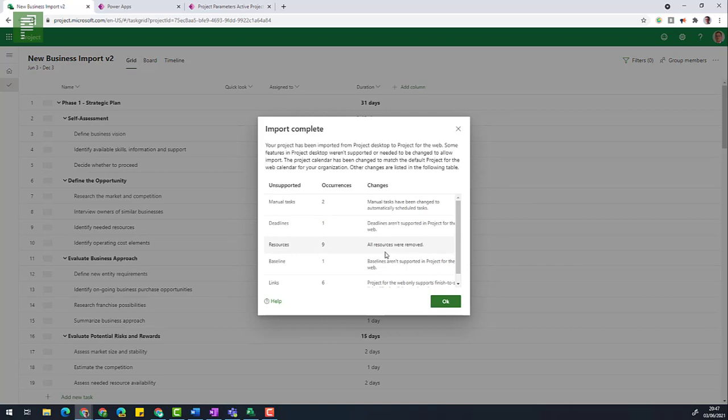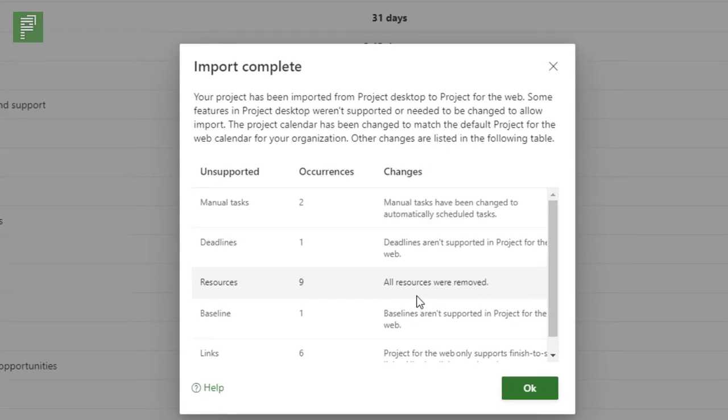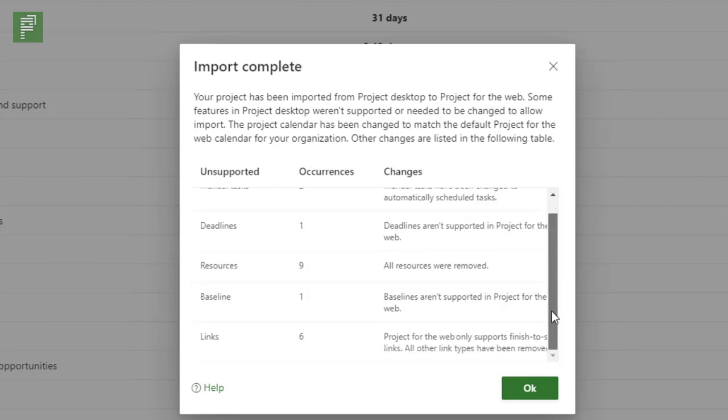It's going very fast, but there are some unsupported actions in here. And as I mentioned, there are a lot. So keep that in mind when you're navigating through importing your projects into Project for the Web. Manually scheduled tasks aren't supported. Deadlines aren't supported. The resources are all removed from the tasks. There is no baseline and there's a couple of links that aren't supported because Project for the Web currently only supports finish to start dependencies.